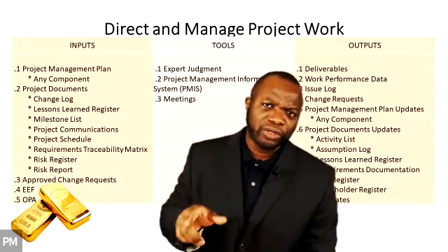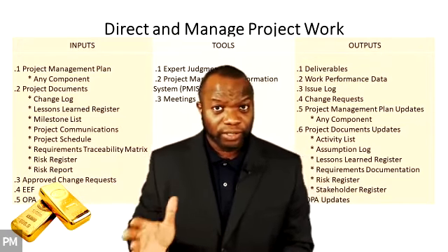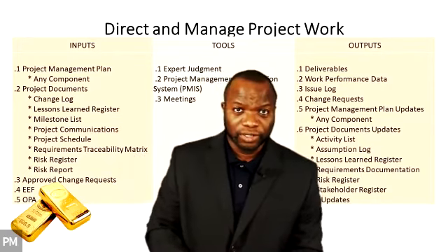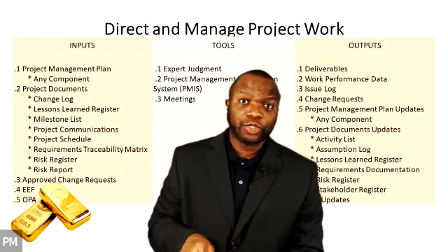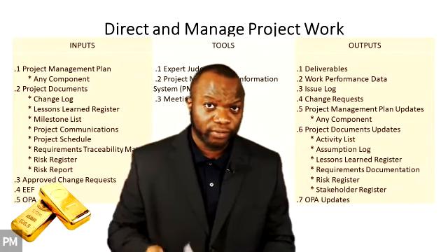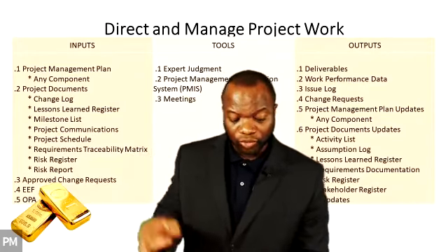Remember what I told you? Project management plan, project documents, they're different, but in some instances, there's some project documents that need authorization. Now, this varies. There's no hard and fast rule. But when it comes to project management plan, that definitely does need approval. You can't just change that as a project manager as you will or see fit.